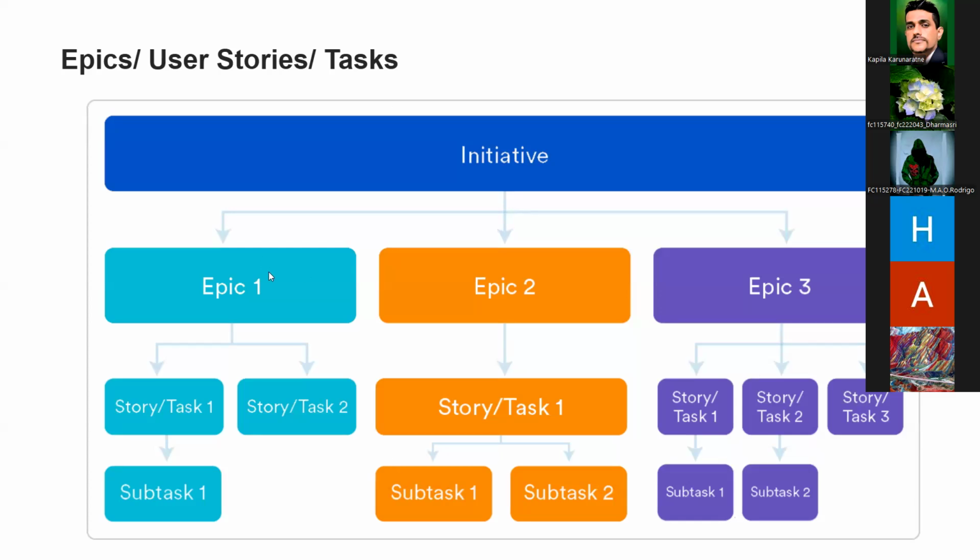You need to have a set of epics that clearly define the requirement, and inside the requirement you will have multiple user stories, and each user story has various tasks, maybe development tasks, QA tasks, BA tasks, or different development tasks. So that's how it will be managed. This is a fundamental thing that we need to know.